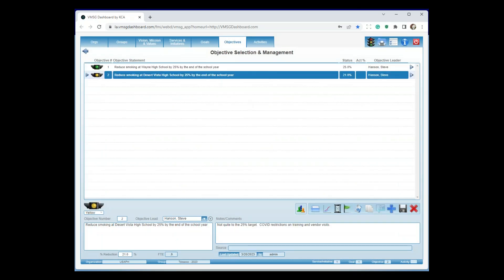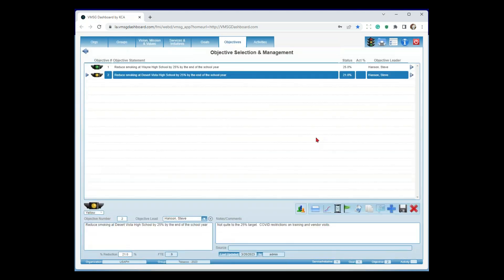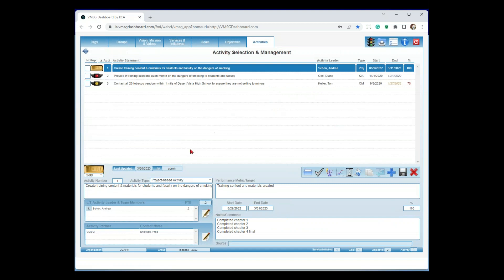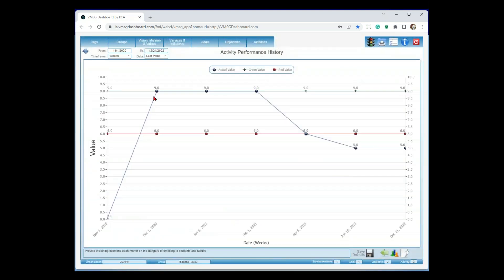Let's look at a different example — reduce smoking at Desert Vista High School by 25%. Notice the yellow light. The note says: not quite to the 25% target, COVID restrictions on training and vendor visits. Looking at the historical chart: when we first started the program, no reduction; we ramped up and got to 21%, not our 25%. So we're a little bit behind schedule, probably due to COVID. I'm going to drill down to the activity level to understand why. Our first activity — create training content — gold bar says it's done. The next one, however, has a big red light: that's the QA activity. My actual value is five, which is below my red threshold of six. Let's look at the chart: first three months at nine sessions, and then we started falling off.